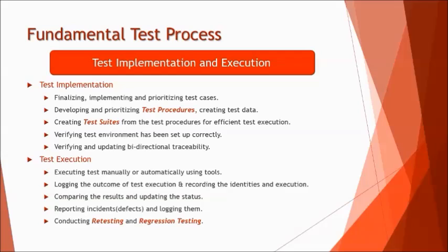If you look precisely into test implementation, it deals with activities like finalizing, implementing, and prioritizing test cases. In the previous stage, test design, you are already done with preparing those test cases, but now you are trying to collectively put them together and sequence them based on priorities like risk analysis, the complexity involved, or the criticality of a particular module, and based on that you prioritize the test cases.